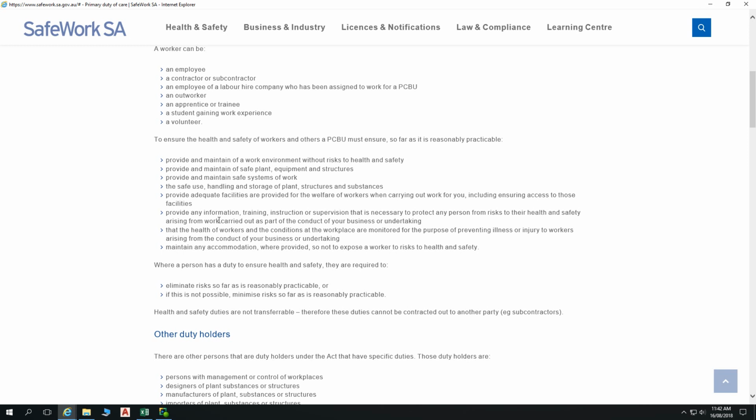But in regards to that time period, there's the builder's liability period, which is typically 10 years, and with your building design insurance, you typically carry that through for 10 years after you finish work as well.